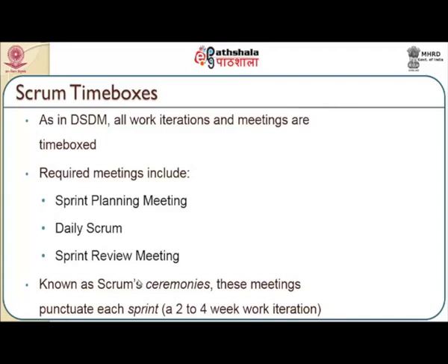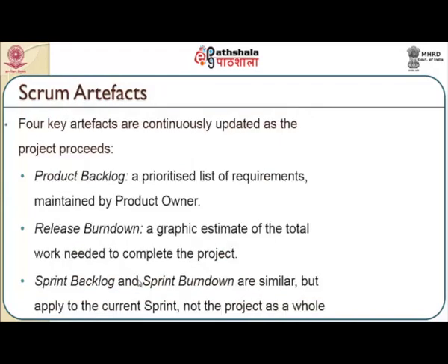Required meetings include sprint planning meeting, daily Scrum meeting, and sprint review meeting. These are known as Scrum ceremonies. These meetings punctuate each sprint, that is a 2 to 4 week work iteration, in which we get an end product delivery. Some of the Scrum artifacts include 4 key artifacts that are continuously updated as the project proceeds.